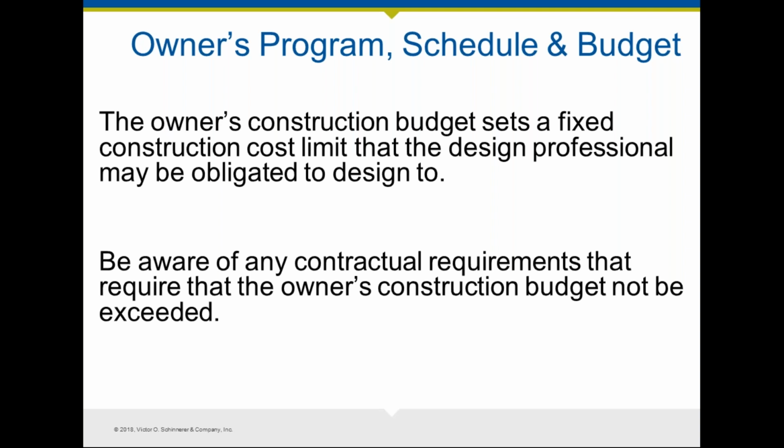Of course, at the same time, you need to be aware of where the money is coming from, especially for the construction cost, which is, again, often a significant outlay. So if they're borrowing the money, what are the lender's requirements? What is expected of the owner before they can secure the loan? How do your services play into that? Does the lender have requirements about what should be in this set of services? All of these need to be identified early on, and you and the owner need to come to an agreement